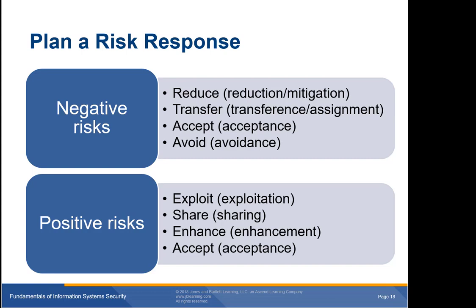Finally, in this category is avoidance. Risk avoidance is just that, deciding not to take a risk. A company can discontinue or decide not to enter a line of business if the risk level is too high. With avoidance, management decides that the potential loss to the company exceeds the potential value gained by continuing the risky activity. For example, a company may decide not to open a branch in a country mired in political turmoil.